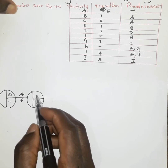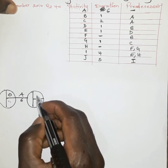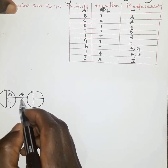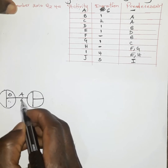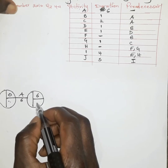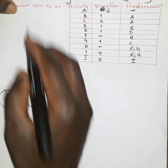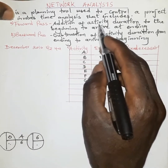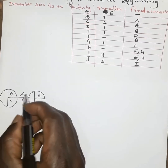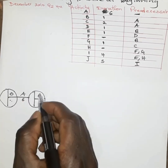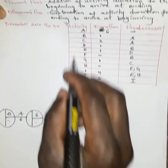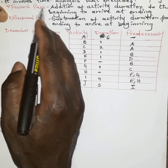How do we get the next starting node for the next activity? We add the duration that this activity took: zero plus six gives us six. Remember, the lower sections are meant for the backward pass. We are now doing the forward pass, which involves addition of the duration to the beginning to arrive at the ending. The beginning of activity A is zero, and the ending is six.